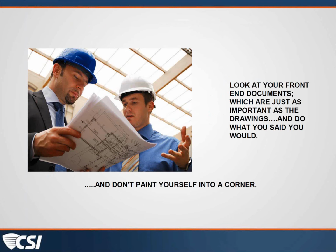Another great example that Doug just reminded me of is change orders. If you have to meet with a board that manages a facility or an educational system, for example, and they have to take action on changes over a certain amount of money, that whole process can be documented and included in your Division 1 document so that the construction community knows what parameters they have to meet.